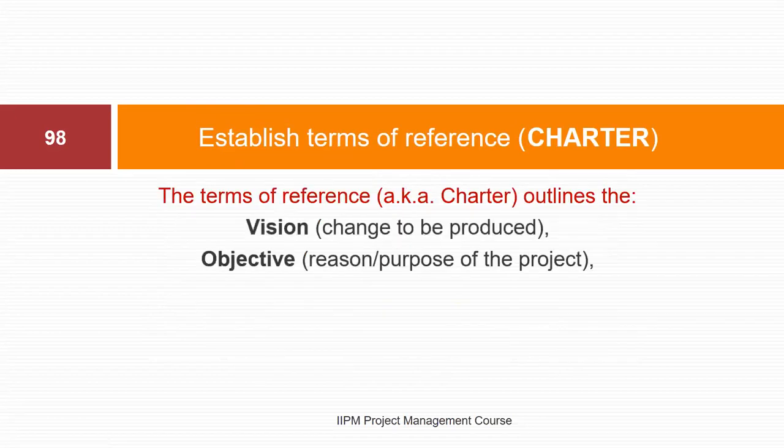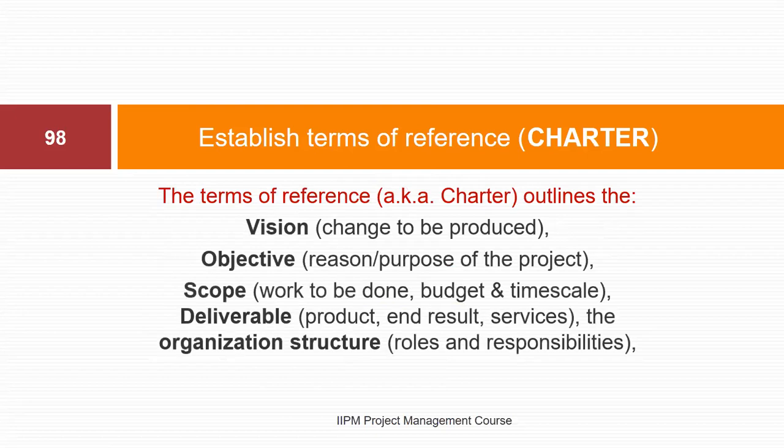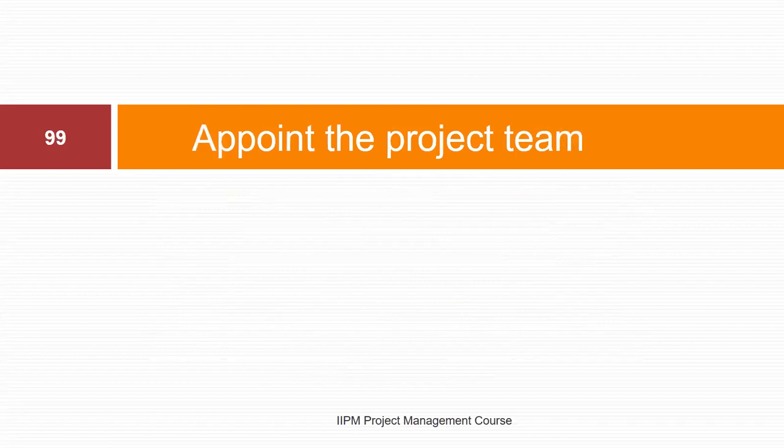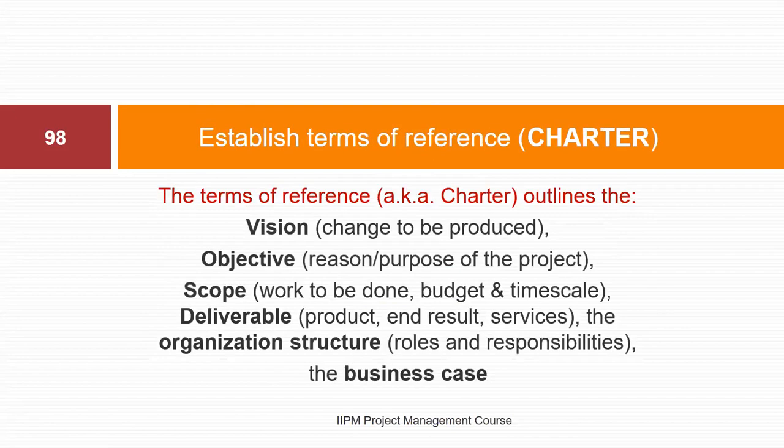Now, the terms of reference outlines the vision, the objectives, the scope of work, the deliverables, the organizational structure, and the business case, as the case may be. If you want to go deeper, then you could establish standards on how the project will be designed, how the project will be executed, and how the project will be evaluated, just as we have in the project governance framework. All right.